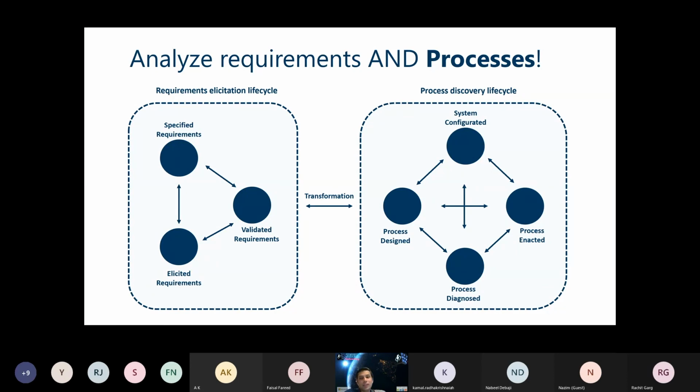You need to consider the business processes. Think of that. What is a process? Processes are essentially what keeps an organization, any business, up and running. And it is absolutely critical to fuse your requirements analysis with the process discovery, identifying what the key processes are, what the sub-processes are, what the process pain points are, what the various KPIs are that the client uses related to those processes, and the end goals of each process.